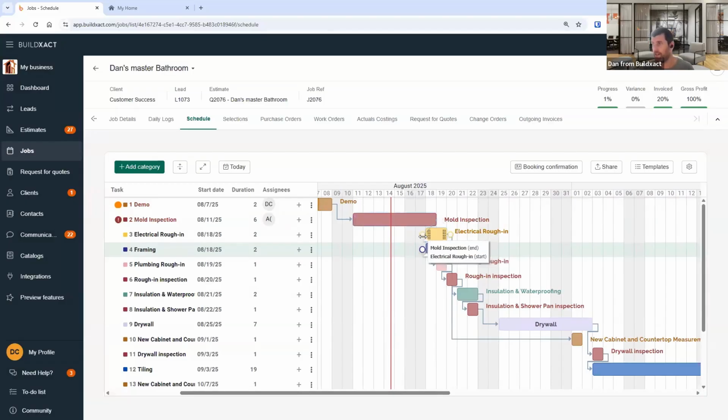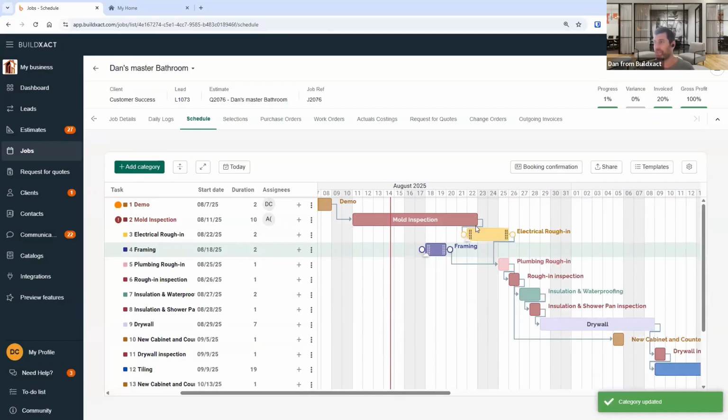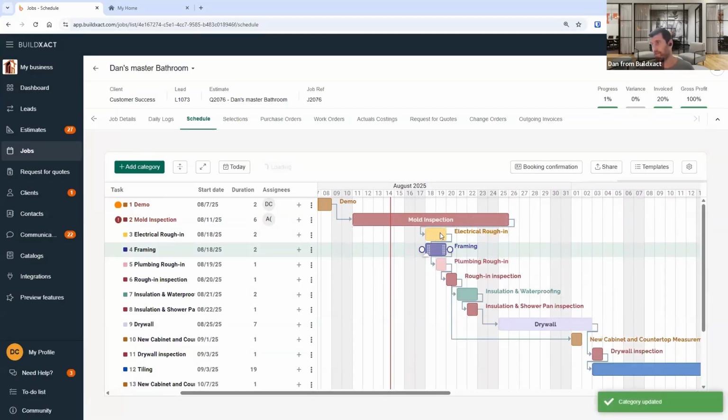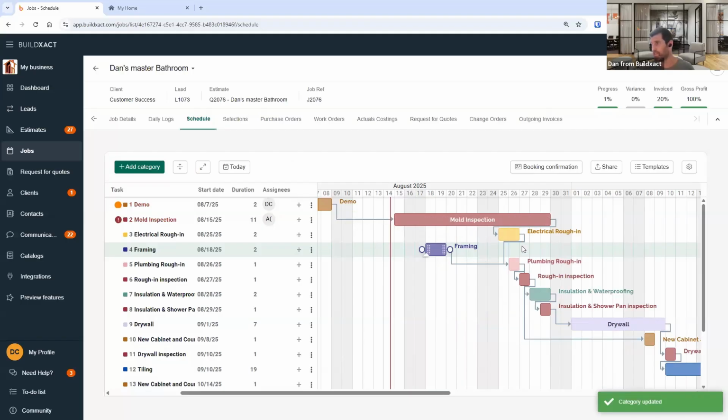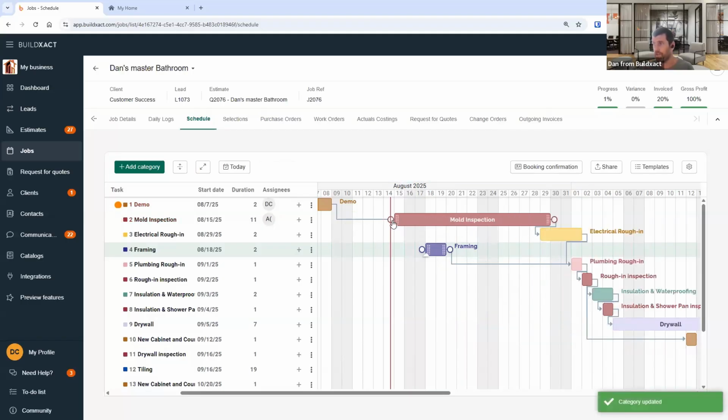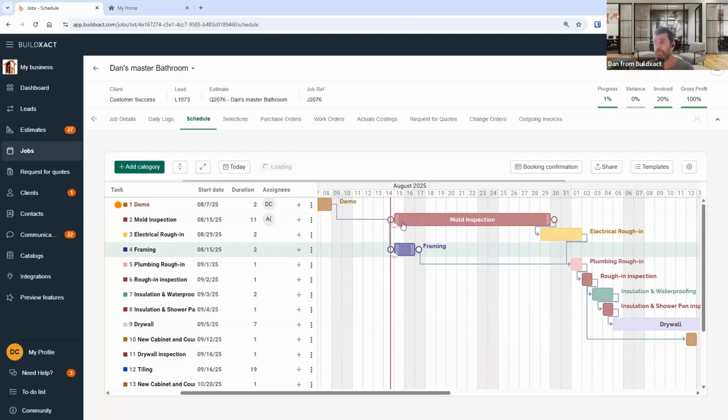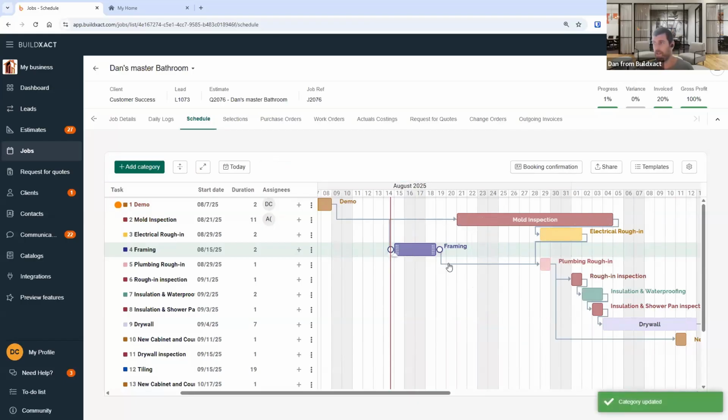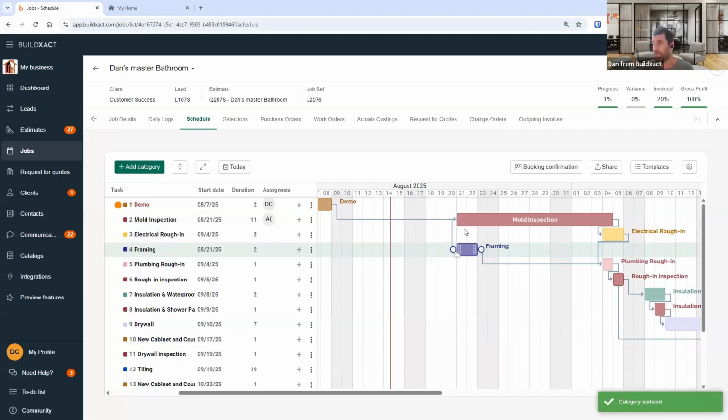So now you can go end to start, which is good, personally this is the one I generally use. It's good if you want the next task to be reliant on the finish date of the previous task. So if it goes longer or if it gets moved entirely, it still all syncs. You can go start to start, which I'll try not to create too much of a mess here. Real difference is that's just sensitive to the start date. So this is generally better if you want things to both start on the same day and you move it and those start on the same day. If it gets pushed back, so does that. It's really just ensuring tasks stay together.